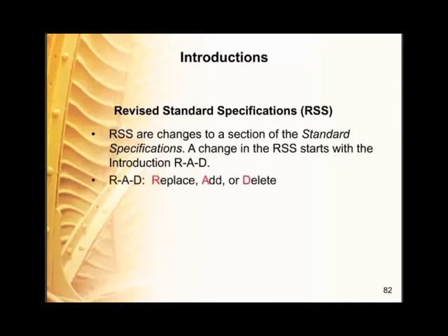When a standard specification must be changed or updated because of revision, we now use an introductory clause that includes the replace, add, or delete for every change. We will refer to this as the RAD method. In the development of specifications, the specification writer must now make a determination to either replace specification language, add specification language, or delete specification language every time a specification is changed. This method of modifying the standard specs makes it clear when a change within the standard specification is made and eliminates what we used to have in the past of conflicts between the standard specifications, the amended to read, and special provisions, because it wasn't clear what was being changed or modified.